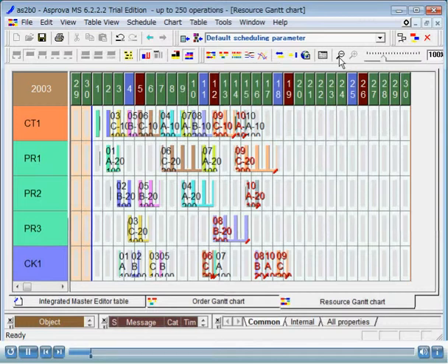Currently, all the days of the week and time periods are displayed in the same width. If there are days of the week on which resources are not usually available, you can hide those days or display them in a narrower width than the normal size. Here, we will hide Sundays and show Saturdays at 50%. First of all, let's open the display settings of the resource Gantt chart.